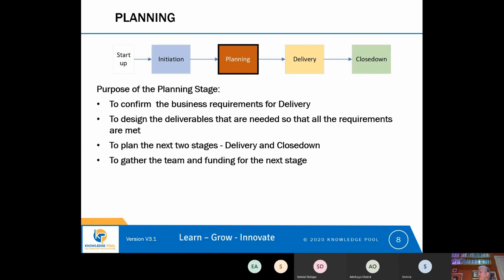our requirements. Now, a better way to do it might be to say, well, what's our most difficult requirement? What's going to be the most difficult requirement to meet? If we can identify the most difficult requirement to meet, or the most difficult requirement under each of those headings, if we pick some software that can definitely meet the most difficult requirement, then in theory, any other requirement that might come out in delivery should be possible for the software to meet.